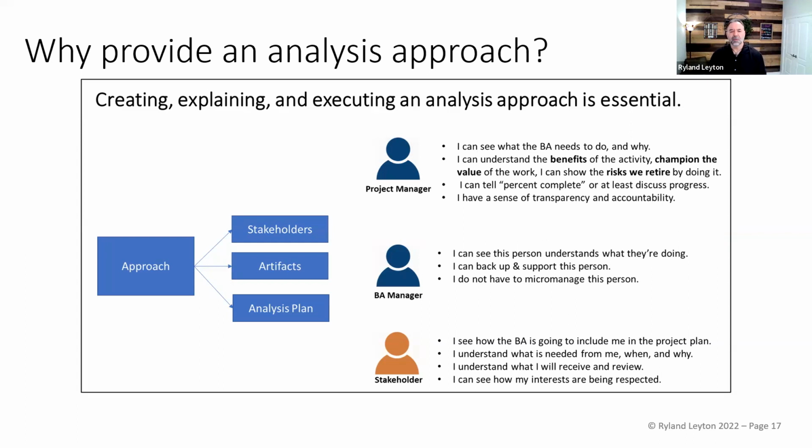But I can be accountable to things like, I have 10 stakeholders to interview and I've gotten 8 of them done. That's 80% complete. And I can't complete the next thing without getting all of them done, though I can start it. I can start a task, but not finish it, given a predecessor activity. Sometimes that works, right? Project managers understand that a lot.